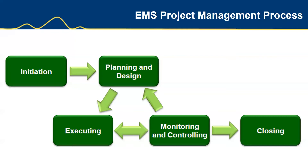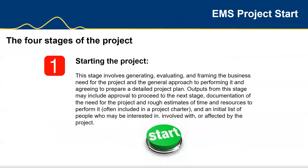Let's get into the four stages of a project. Stage one — starting the project — involves gathering, evaluating, and framing the business needs for the project and the general approach to performing it, and agreeing to prepare a detailed project plan. Outputs from this stage may include approval to proceed to the next stage, documentation of the need for the project, rough estimates of time and resources, a project charter, scheduling, and an initial list of stakeholders involved with or affected by the project.